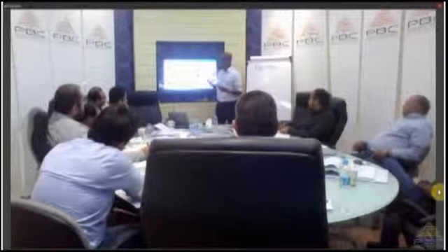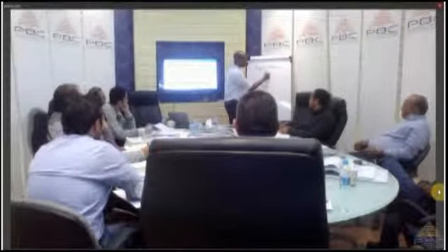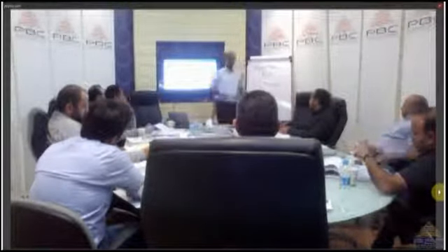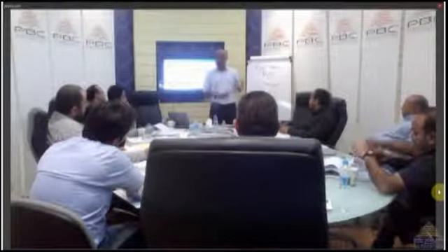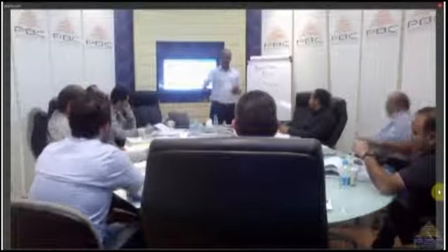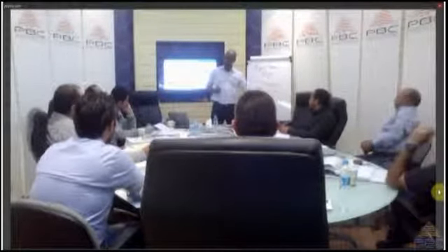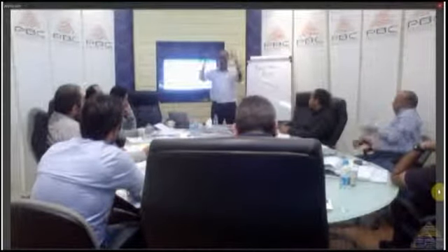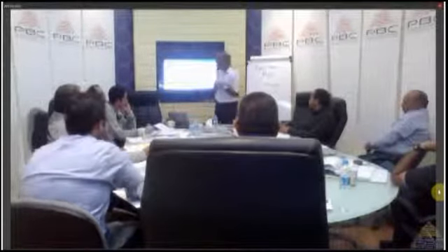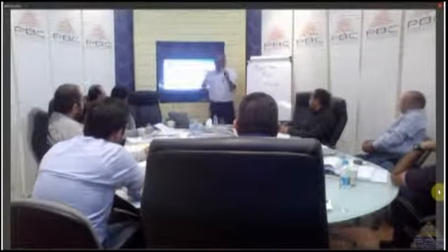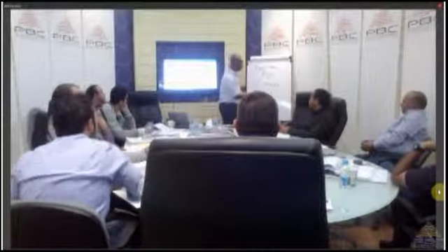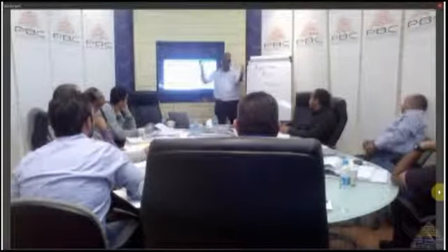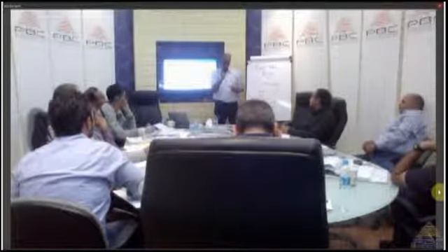But at this stage, we're only specifying the roles, not the names. We don't know yet who will be doing what, but at least we know the roles we need. So I need 5 engineers, 16,000 laborers, 5 contractors, 200 crane operators. I'm just talking about the roles. The output of this plan should be an organization structure for my project.